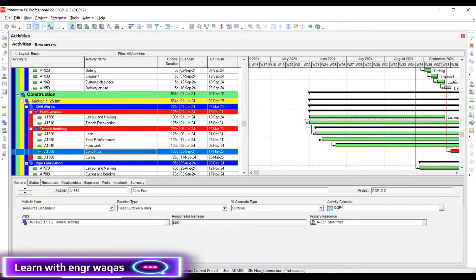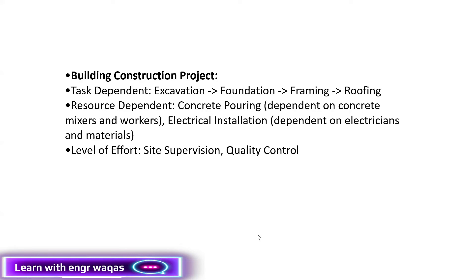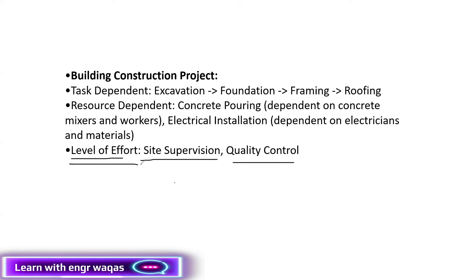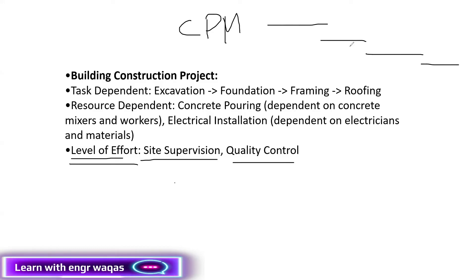Then we have Level of Effort activities. The definition: activities like site supervision, quality control, or something which is not directly relevant to the project tasks. When Primavera P6 is going to calculate CPM, it takes the longest dependent activity series. CPM definition is: the longest dependent activity series, and that would be the minimum project duration to complete the project — the minimum time within which I can deliver my project.